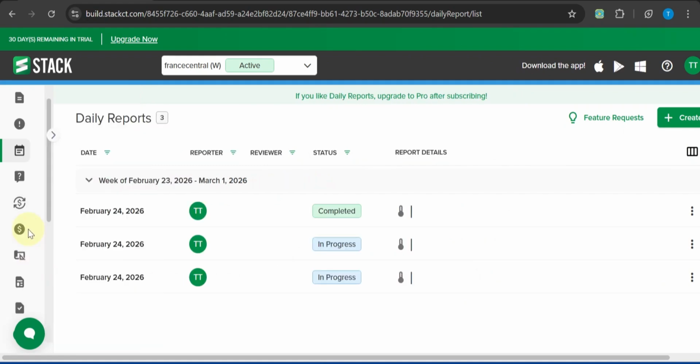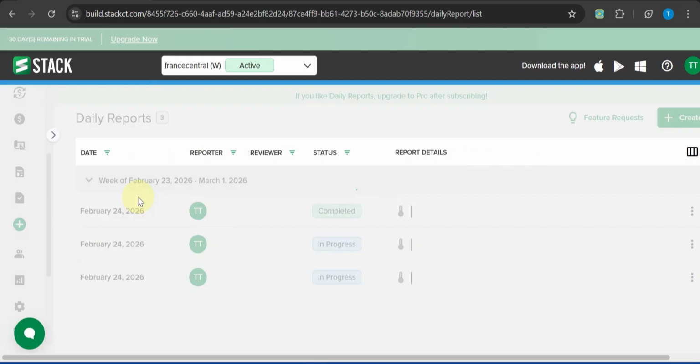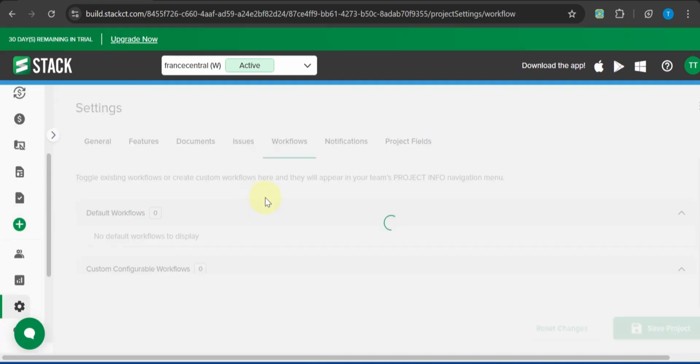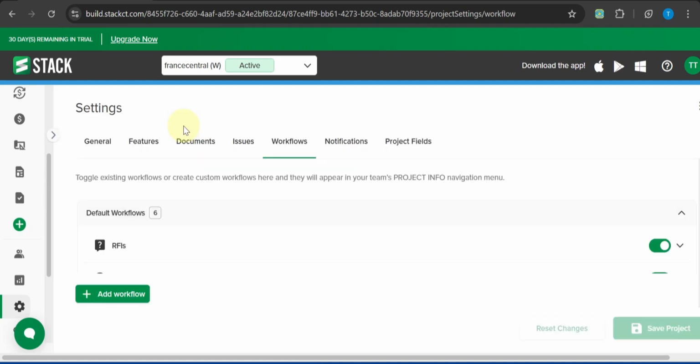For example, filter to show only open issues due this week that are assigned to electrical. Instantly, your dashboard becomes a daily action board for that team, making stand-ups faster and follow-up clearer. If something looks missing, double-check the status, dates, and assignments, because filters are often the cause. Keep your data updated and keep your filters intentional.